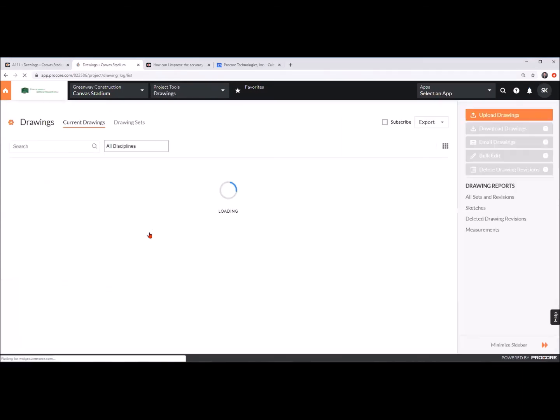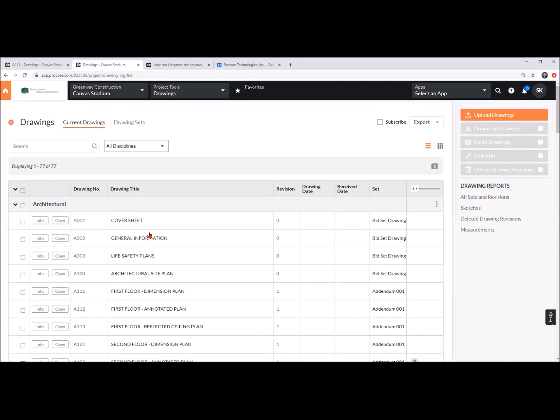That brings me to a good point. I was working with a client last week, and maybe this is beneficial for some folks on the line. This is a workaround for constructability reviews. Because our markups are either public or private, and we don't have drawing markup groups that are only public to a certain group of people, what I recommend is making the individuals included in that constructability review admin level users, and then we upload those drawings.